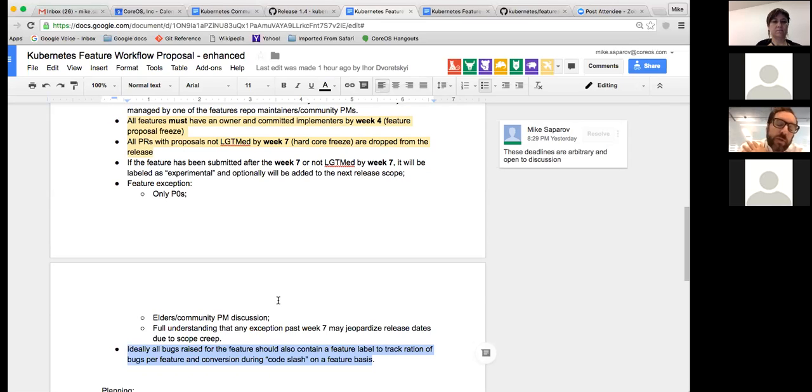We've heard from the community generally that dates or even T-minus dates aren't fantastic. It's better to give clarity around the thing. That said, if something isn't clearly passing alpha by, call it, the code freeze date, it's not going to make the release. Yeah, clearly, I agree. We're trying to decouple the life cycle of features from the life cycle of the Kubernetes project, but we need to be very clear about what the touch points are when we sync those things back up. That's all that I'm asking for.